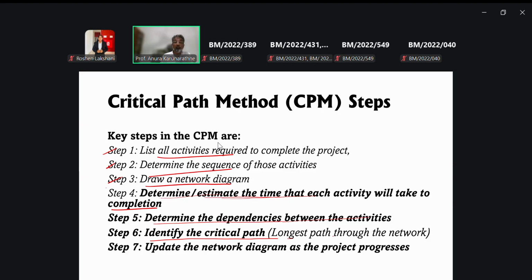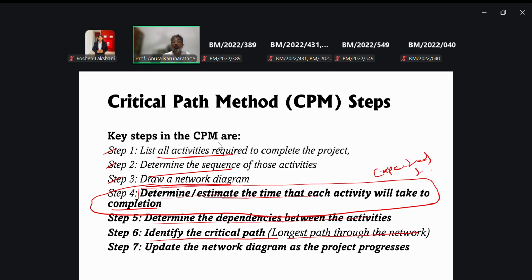Now, in this stage, we have to identify the critical path. The only change here is under the PERT method. So there is a mechanism to measure the expected time. This is called expected time. Under the probability approach, we can compute it under the PERT method, right? But under the CPM, under normal conditions, we have no issue with that time estimation, expected time. It is given, right? Then we can easily perform the critical path, right?